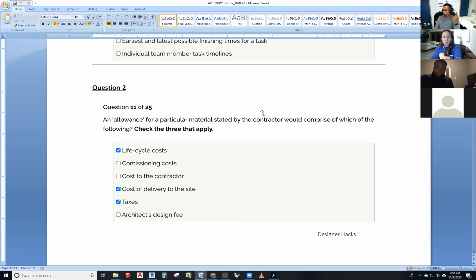Alternates, maybe whether we're gonna use a wood door versus a hollow door, a fiberboard door. So we don't know. So you know what? I'm gonna put an alternate for one and the other. I'm gonna price it separately. And then when the prices come in from the bids, the owner will decide whether he wants to keep alternate one or discard alternate one.